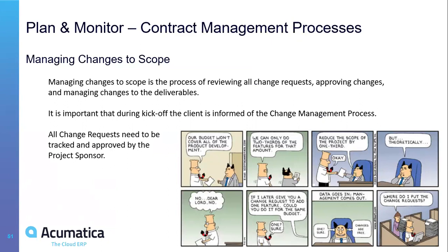But it's true if, for example, they cancel the training and it will affect the overall project schedule, I would issue a change request for it and ask the customer to sign on it and say, here, you asked me to cancel the whole training next week, or you didn't deliver the data migration templates in time that we needed. This is affecting the project. It's a change to our overall plan and schedule. Please sign that you accept that we have this change and that it will affect the project overall.